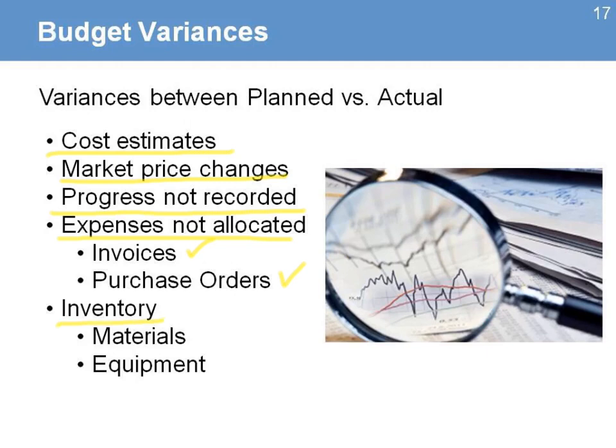Another element that is also important to find the difference between what we plan to spend and how much we spend is inventory. Usually inventory does not take into account when you are calculating earned value. Earned value is calculated for all the activities that are being completed. For example, I am completing a school and I am building the walls, but in inventory I may have 100 bags of cement. I cannot use that value to represent what is actually implemented or is built.